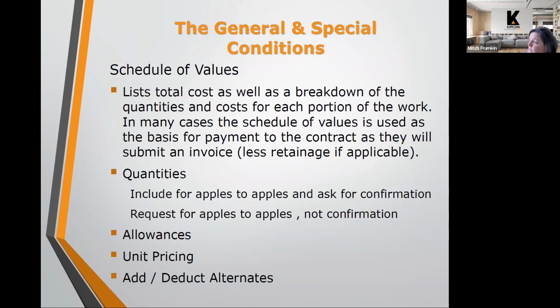And the unit pricing gives you a way to see what those costs might be, so it's not a surprise. And then also during a project, there may be aspects to the project that are added. Oftentimes I see on pavement projects, there are sidewalks that are added to the project while it's in progress. So there may be things that are added as you go along.